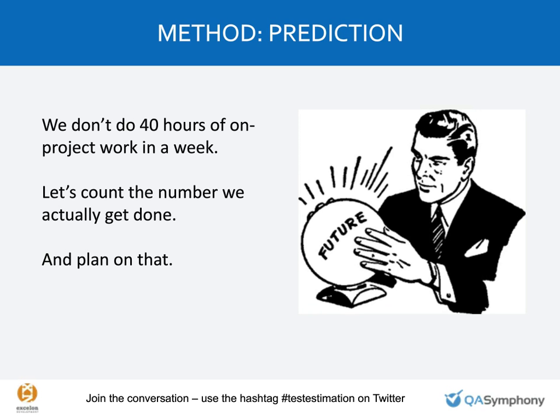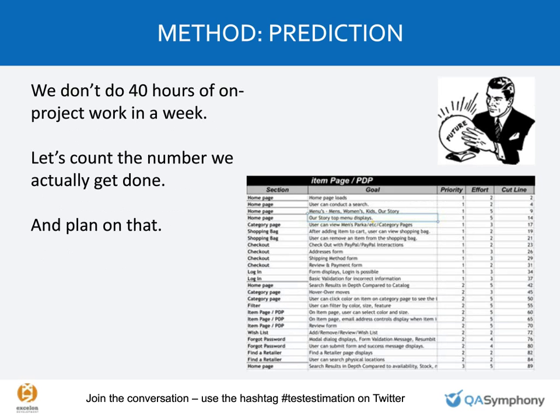We said, okay, fine. So what's the day? A day is 60 times 8 hours divided by 5 minutes apiece. You should get so much done. Well, count how much you actually get done that first day, and then reproject, assuming that velocity, how long it's going to take you. And they got reasonably accurate estimates that way, right?